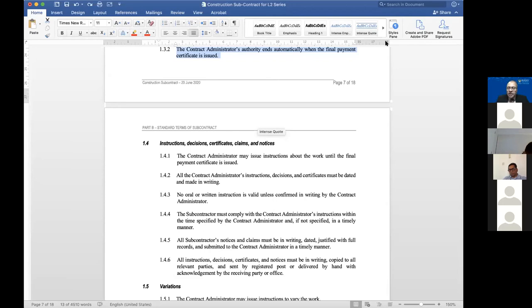Surely that has to be the case. In this subcontract, if you put the payment is 1.2 million, and the main contract includes a $500 million job, which should prevail? Answer, of course, this subcontract. Who administers this subcontract? In the main contract it is the architect. In the subcontract it is the contractor, right? The contract administrator. Which should prevail? Of course, this has to prevail. You can't have the architect administering the contract because the architect in the main contract would say, I'm sorry, this is a domestic subcontract. I don't even know it exists. It's none of my business. I'm not going to administer it. I'm not paid for it. So all the time, what is stated in this subcontract will prevail, no matter what you try to do back to back.